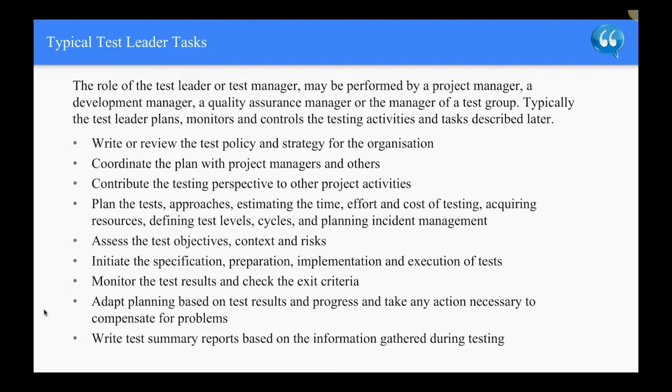Typical test leader tasks may include: write or review the test policy and strategy for the organization; coordinate the plan with project managers and others, contributing the testing perspective to other project activities such as development, integration, and implementation; plan the tests, including selecting test approaches, estimating the time, effort, and cost of testing, acquiring resources, defining test levels and cycles, and planning incident management; assess the test objectives, context, and risks; initiate the specification, preparation, implementation, and execution of tests.